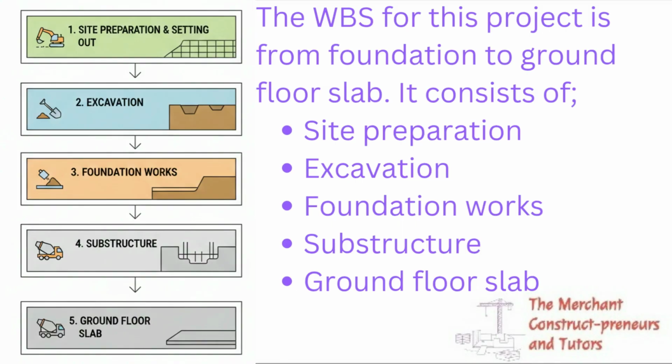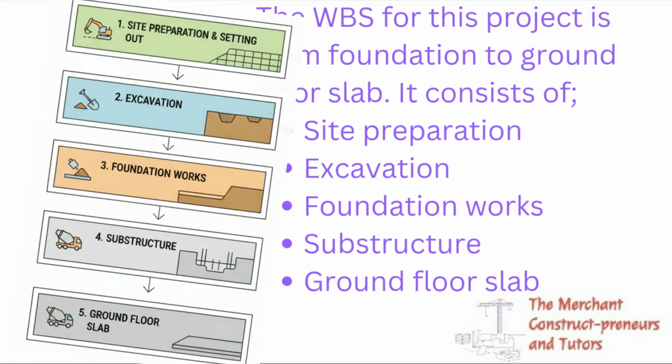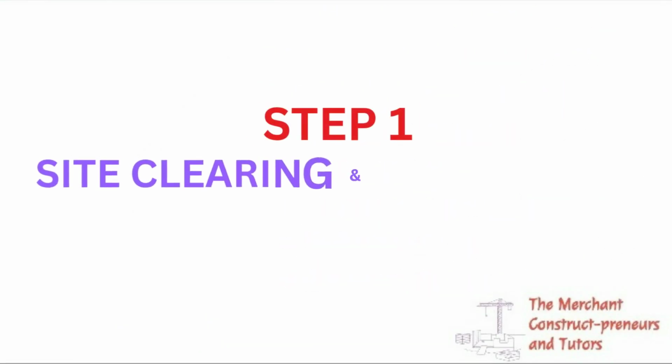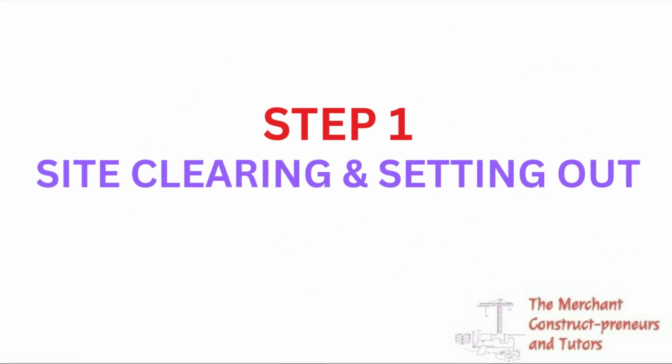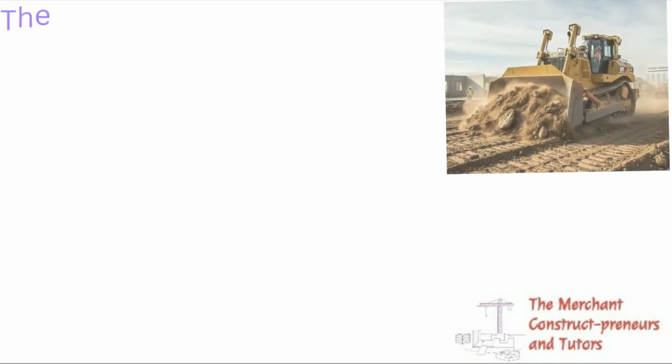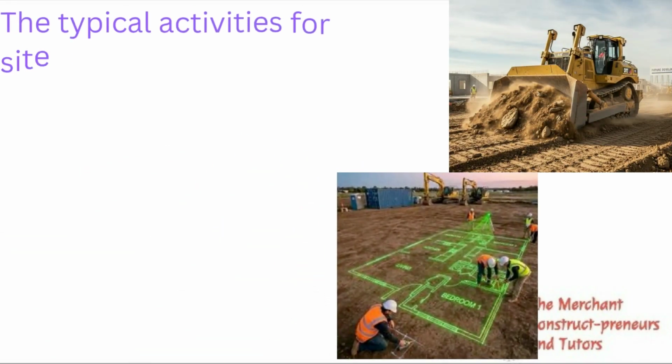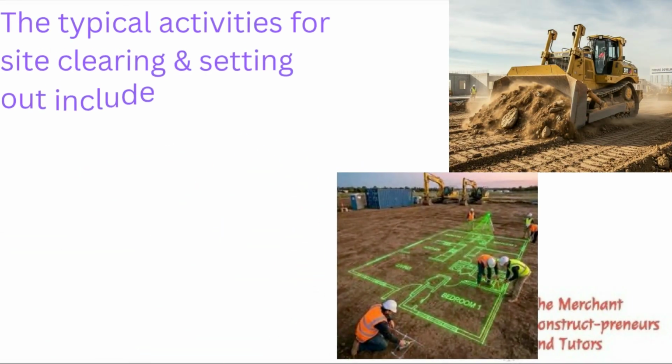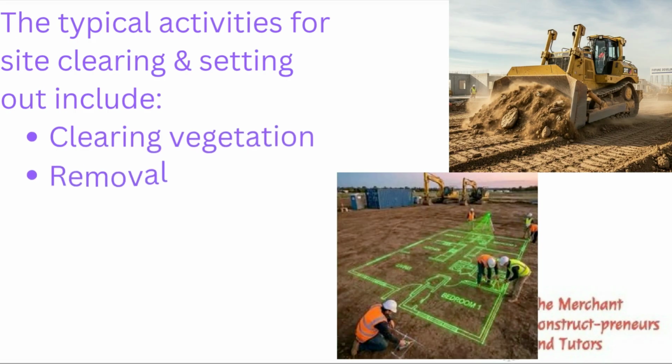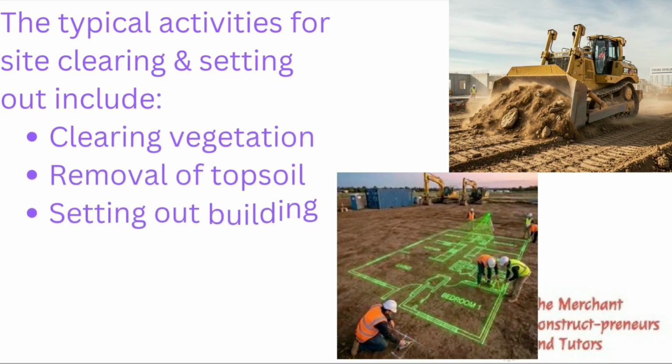So step one, we have site clearing and setting out. That's the first step. When you get to site, you do the clearing, removal of stumps, and excavation of the topsoil.